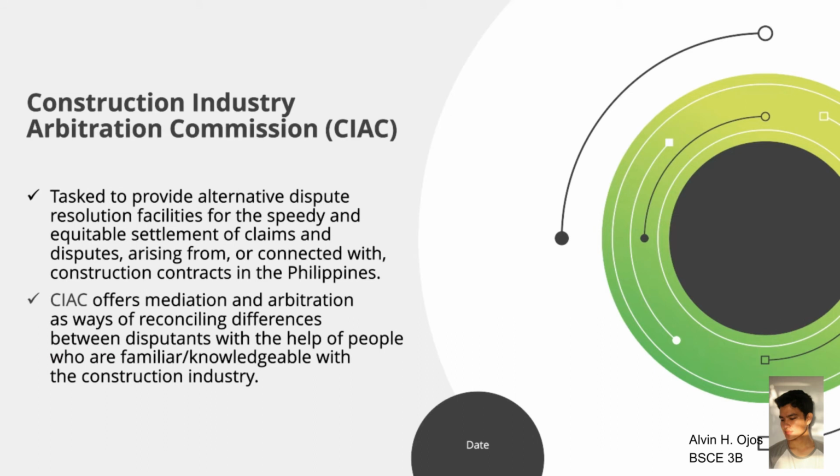One of the implementing arms of the CIAP is the Construction Industry Arbitration Commission, or the CIAC. CIAC is tasked to provide alternative dispute resolution facilities for the speedy and equitable settlement of claims and disputes arising from or connected with construction contracts in the Philippines. The CIAC offers mediation and arbitration as ways of reconciling differences between disputants with the help of people who are familiar or knowledgeable with the construction industry.